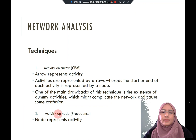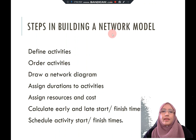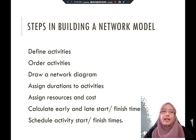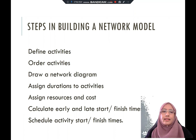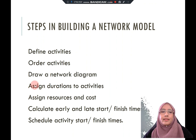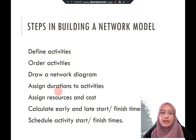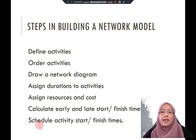The second technique is activity on node, where the node represents the activity. The steps in building a network model are: first, define the activities; second, order the activities — what comes first, second, and next; then draw the network diagram. Once the diagram is developed, assign the duration for each activity, assign resources, assign costs, and calculate the earliest start, late start, and schedule the activity start and finish times.